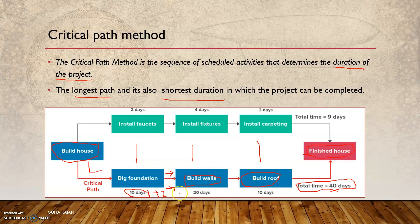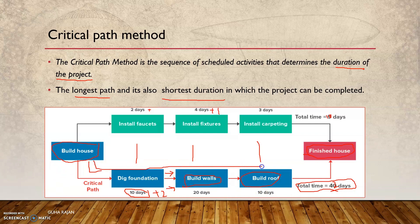If there is a delay of two days, you can start build walls only on the 13th day, which means instead of 40 days, this project is going to take 42 days. Whereas even if install faucets or install fixtures takes one extra day, it doesn't really matter — it doesn't impact the schedule of the project, because that activity can still be fitted within the schedule. So as per the plan, this is what is called the critical path — 10 days, 20 days, 40 days in total. All three activities — dig foundation, build walls, and build roof — are on the critical path, and you cannot delay any of these activities.